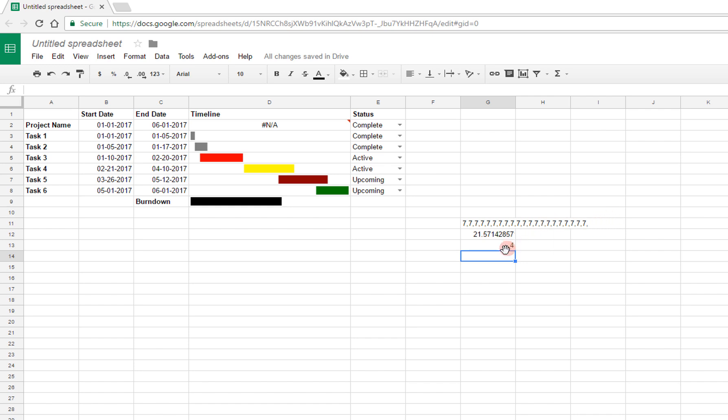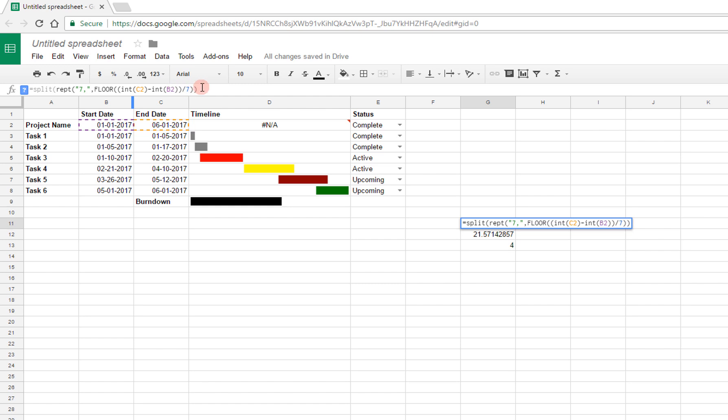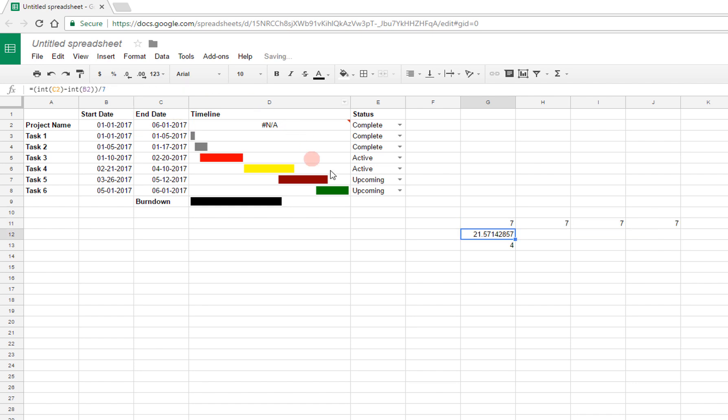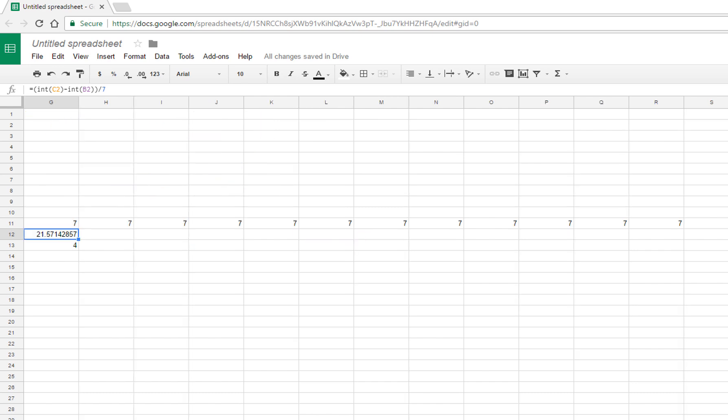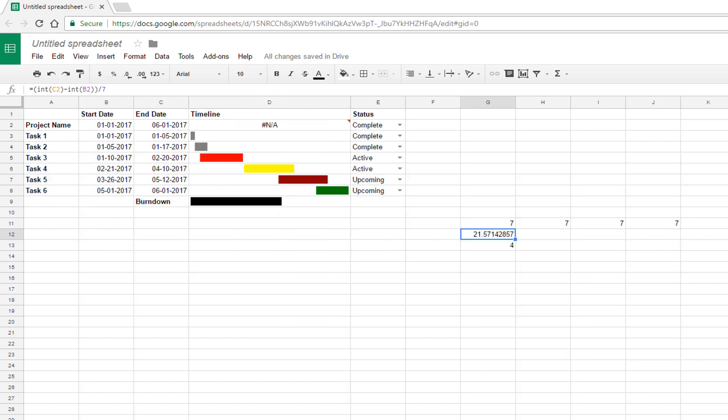And so another function that we're going to use, because this is not the kind of data that Sparkline will accept, it'll need data in each cell separately in order to create your chart, I'm going to use the split function. And so here I'm going to take this, and I'm just going to add split this thing that I created, and split it on commas. That's what I'm specifying right here. And if I do that, then you can see that now I get each one of those 7s in a separate cell of its own. And I'm going to tag on this 4 onto the end.